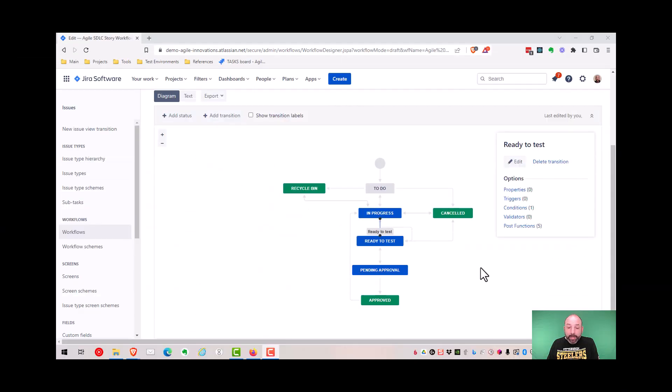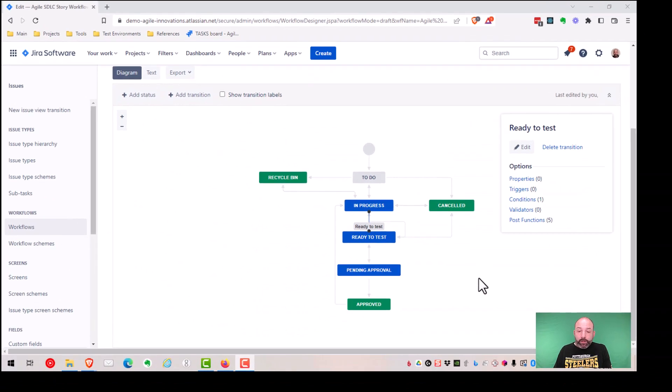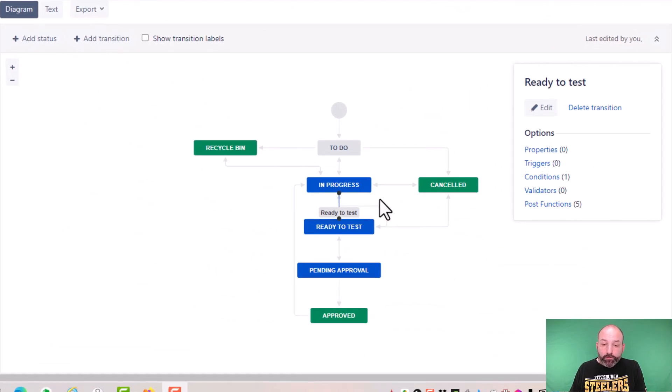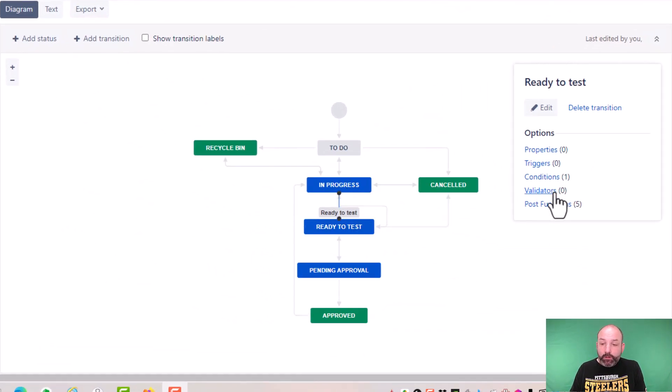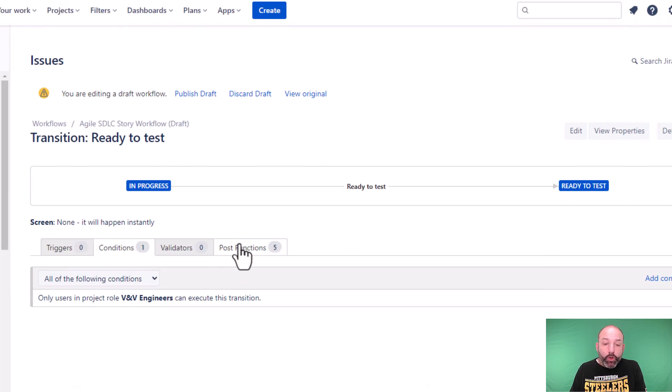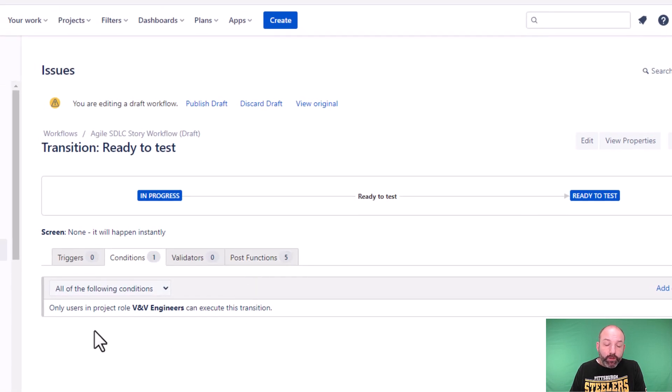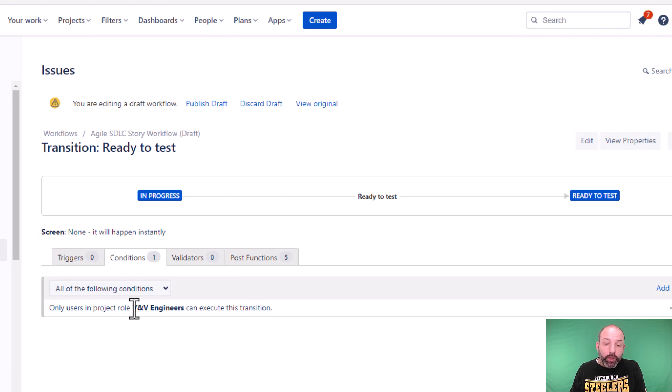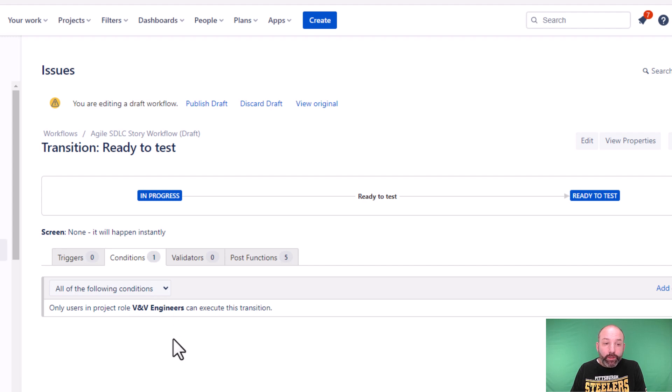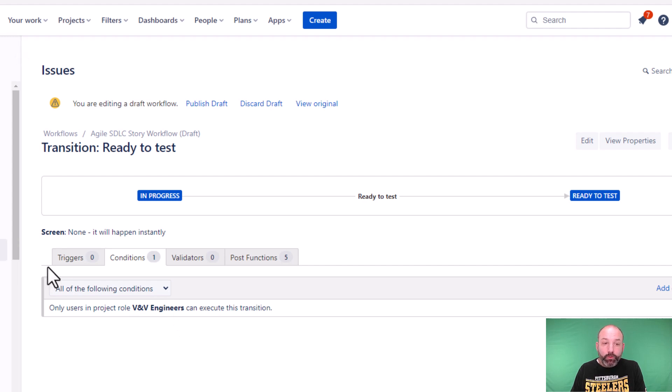Okay, now let's look at our workflow. We can see that in our transition from in progress to ready to test, we have a single condition. This condition restricts the transition to a specific project role, in this case, VNV engineers. This is how we're able to ensure that only the right users are able to execute this electronic approval.